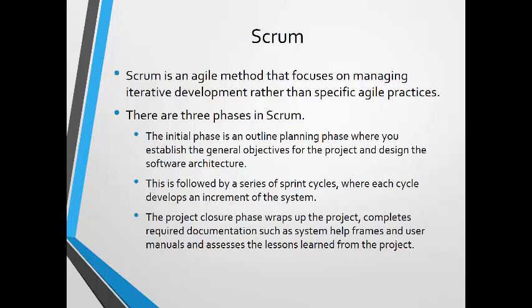Product backlog is a list of to-do items which the Scrum team must tackle. They may be feature definitions, software requirements, user stories, or descriptions of supplementary tasks that are needed, such as architecture definition or user documentation. Velocity is an estimate of how much product backlog effort the team can cover in a single sprint. Understanding a team's velocity helps them estimate what can be covered in a sprint and provides a basis for measuring improving performance. And of course, I'd be remiss if I didn't talk about a sprint, and that's a development iteration. These are usually 2 to 4 weeks long.